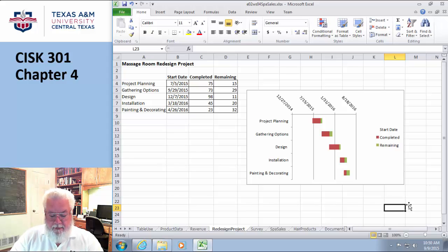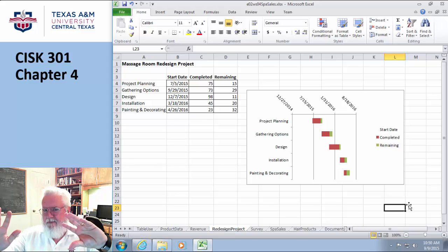Cool? Okay. So it took a little bit to make a Gantt chart look like a Gantt chart. First I created just a plain old stacked bar. And then I had to reverse the order of the elements on the y-axis to match chronologically. Then I had to go in and make one of the elements actually disappear, the blue one, which was that start date. It made the start date disappear. And then I still couldn't read the date, so I actually had to put the dates at an angle. And ta-da! Now we have something that actually looks like a Gantt chart.